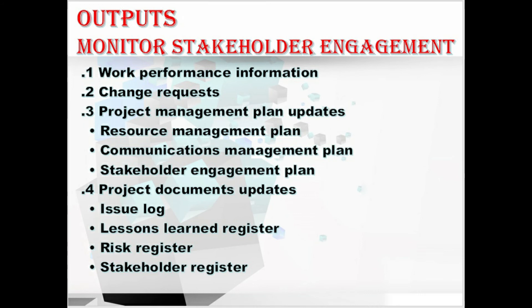Let's move to the outputs, starting with work performance information. This may include information about the status of stakeholder engagement, such as the level of current project support compared to the desired levels of engagement as defined in the stakeholder engagement assessment matrix, the stakeholder cube, or other tools. The next output is change requests — corrective and preventive actions to improve the current level of stakeholder engagement must go through the perform integrated change control process.